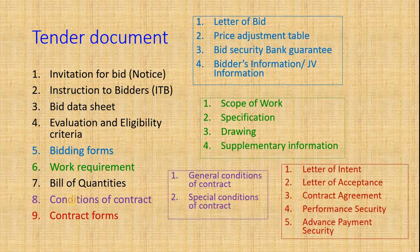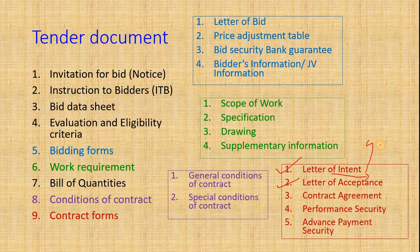Contract Forms are also attached in the Standard Bidding Document (SPD). The first is the Letter of Intent, which is issued to all bidders who have successfully passed the eligibility criteria. After seven days, the Letter of Acceptance is issued. The Letter of Intent is issued to all, but only the name of the successful bidder is mentioned. The Letter of Acceptance is given only to the successful bidder.